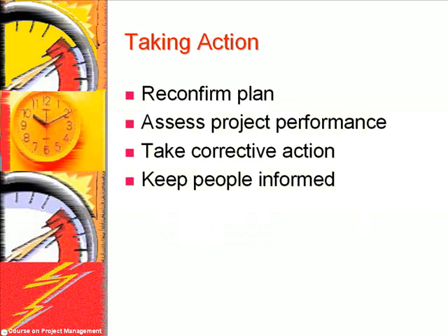When monitoring a project, it's important to start the effort by reconfirming the plans. Then, the project's progress is assessed and at designated intervals reported to key people through status reports. When necessary, a corrective action is taken. If more resources are necessary to get the project back on track, then a formal request needs to be made. If the project cannot finish on time and under budget, it's important to figure out the consequences of the delay on remaining activities of the organization.